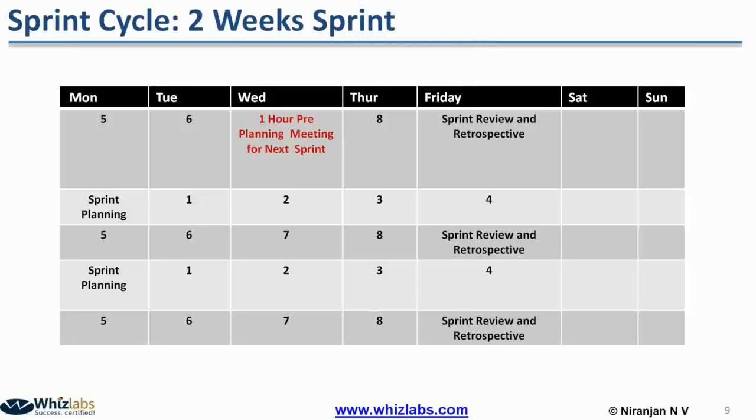If the sprint planning has to go smoothly, then the team members have to be clear about what product backlog items the product owner has finalized to take up on that particular day. If things are not clarified, then the team may get stuck and may not have the sprint planning meeting completed. Because of that, normally the pre-planning meeting is scheduled a few days before the sprint planning meeting.